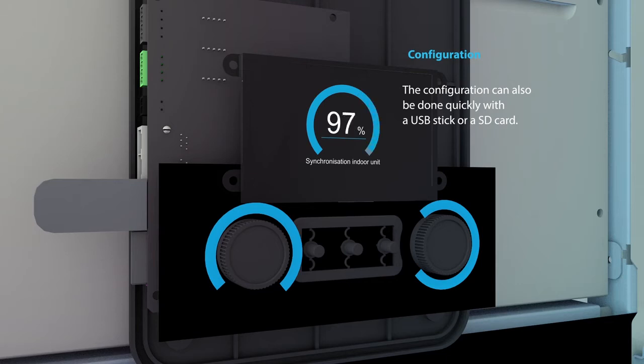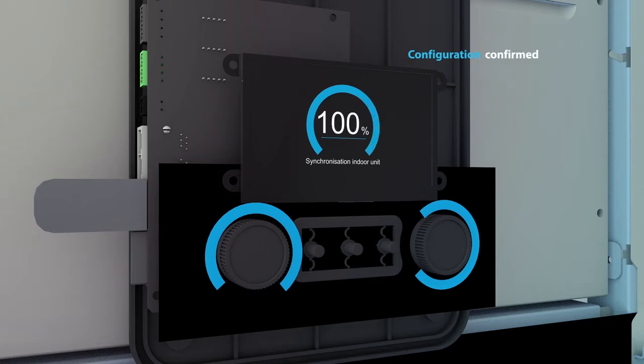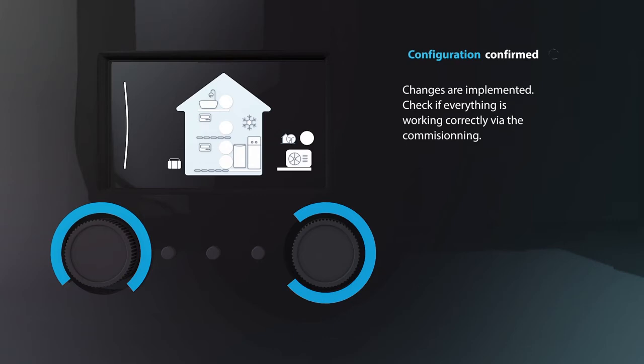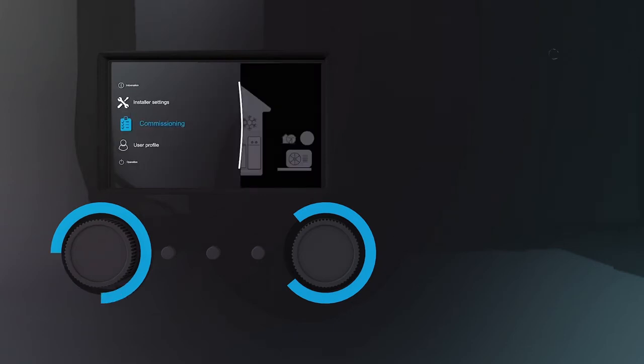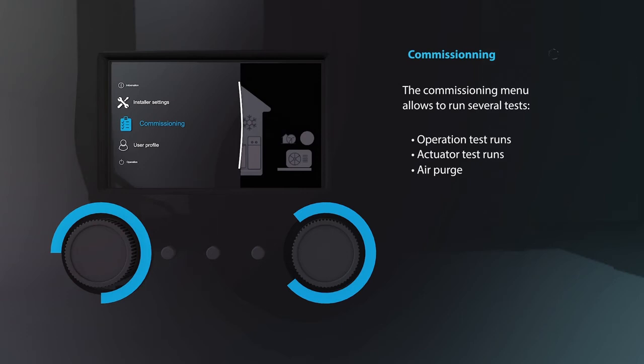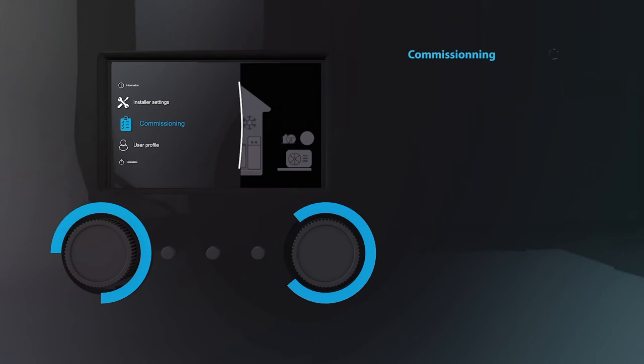Once the system has rebooted and implemented the changes you are able to check if everything is working correctly. Scroll down to the commissioning tab and you'll find several tests that can be done to check if the installation runs smoothly. These include operation test runs, actuator test runs, an air purge, and if applicable an underfloor heating screed dryer test can be performed.